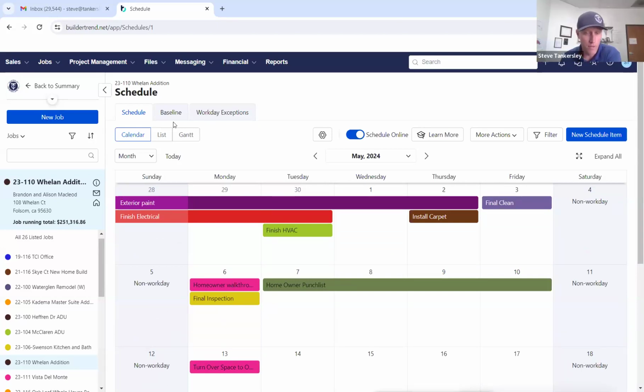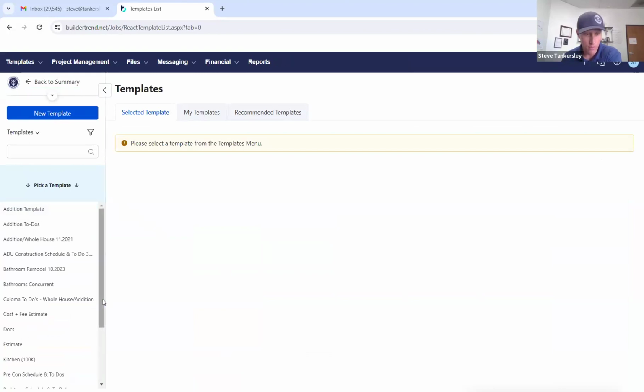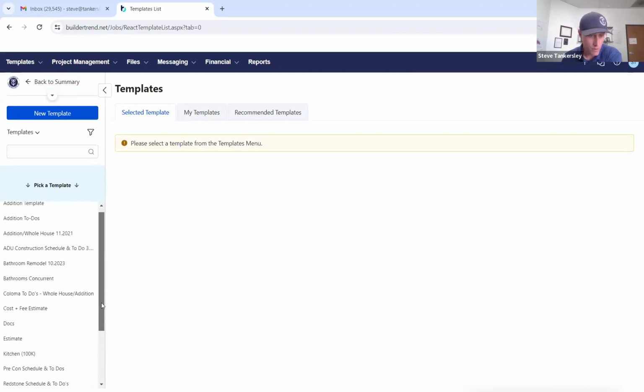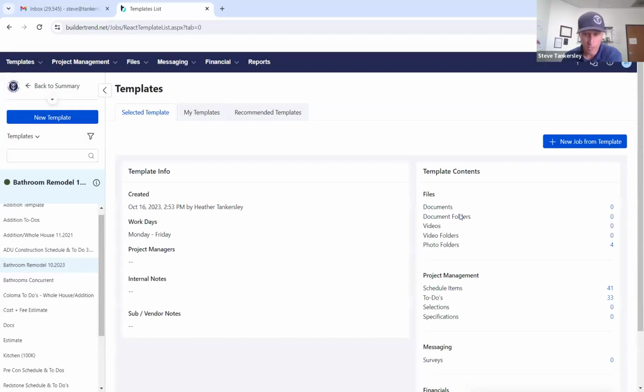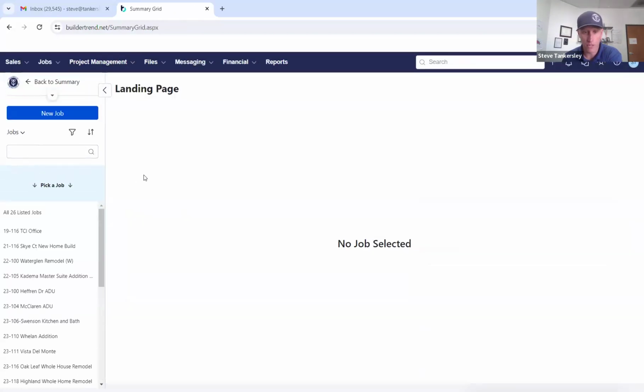That's a good question. We've built out templates in our company. So if you go to right here where you see jobs, I can switch to templates. And when we start a new project, we'll open up a template for, let's say, I have a template for a bathroom remodel right here. So that template's been generated. We upload it. We can copy from a previous project. So let's say this project is just like one we finished. What's cool is we can go through and copy that actual as-built schedule and transfer it over to the new project.